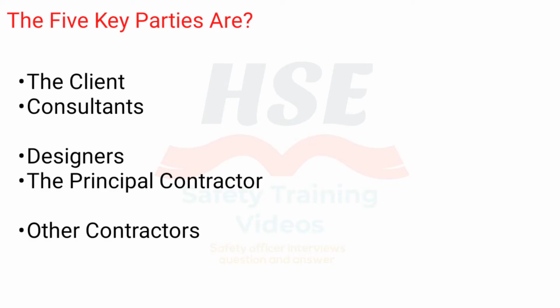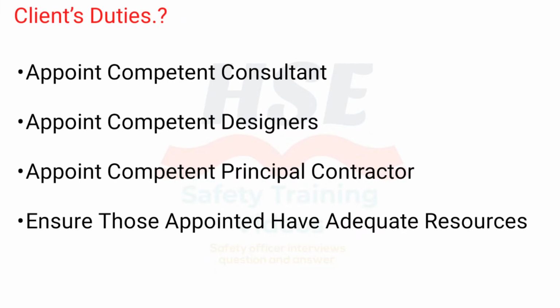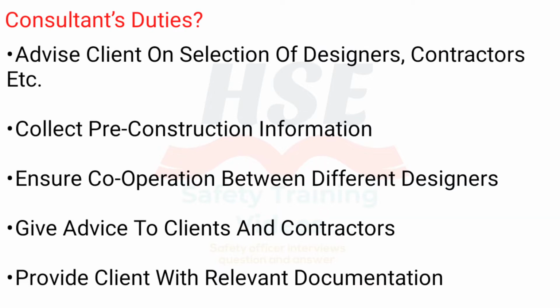Management of a significant construction project. The 5 key parties are the client, consultants, designers, the principal contractor, and other contractors. Client's duties: appoint a competent consultant, appoint competent designers, appoint a competent principal contractor, and ensure those appointed have adequate resources.